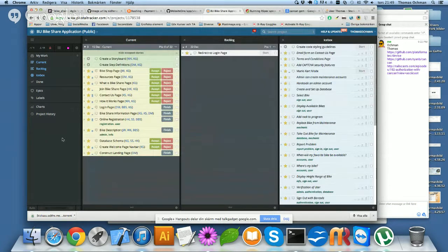Sometimes people say 1 point, and some other team member says 3. That says something to me as a project leader: there's a discrepancy in how people perceive this particular story. One says it's a very uncomplicated story, while another says it's a 3-point story. That means we need to discuss this further, so everybody's on the same page. You know what I mean?